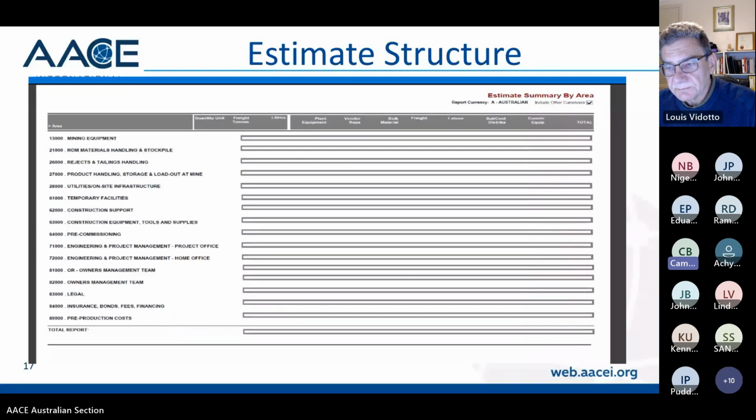We've got one from John Boyle. Does the AACE give recommendations for P50s? It gives recommendations on the range of accuracy that you should allow in your estimating. Certainly, a P50 is the accepted norm for a project budget. And then companies will either do an upper and lower limit of P80 and 20 or P90 and 10.